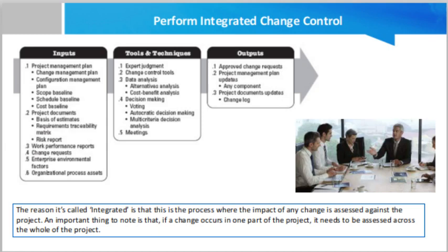Now, work performance reports. The work performance information reports should be distributed with the periodic collection of data, including schedule progress, subsequent delays and their causes, critical path activities, activities presenting delays, actions for recovery, and other vital data for managing the work. On the whole, it is a physical representation of work performance information compiled in project documents intended to generate decisions, actions, and recommendations. Work performance reports for the Perform Integrated Change Control process include resource availability, schedule and cost data, earned value management, and burn up or burn down charts.